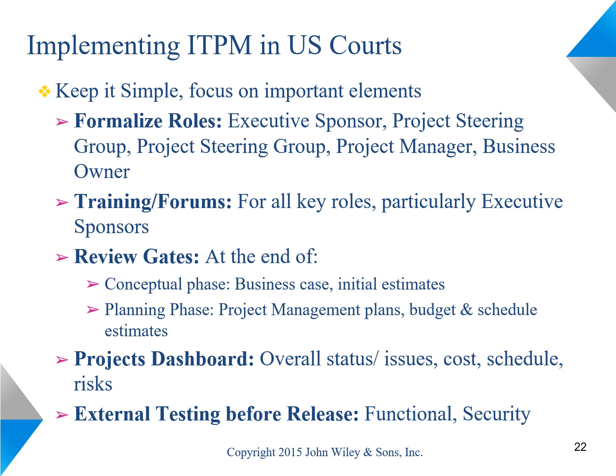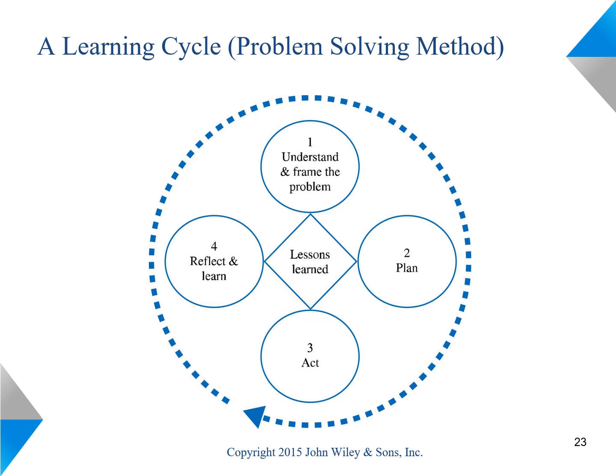We required all systems to go through external testing, which was an organization within US Courts located in Phoenix, both for functionality testing as well as security testing prior to the release to the users. So those were the key attributes of the customized ITPM that we decided to implement in US Courts.